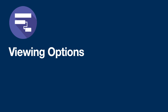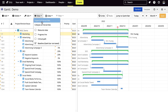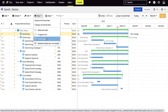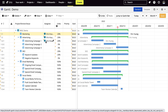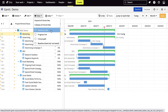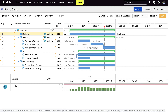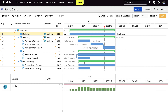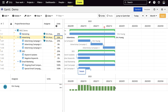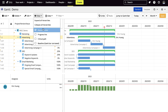In the view section, you have the option to open resource view, progress lines, critical paths, and baselines. Resource view allows you to see how much of a workload is allocated on an assignee. If the bar is green, it means the assignee's workload is within the limit or below. If the bar is red, it means the assignee's workload has exceeded its limit.